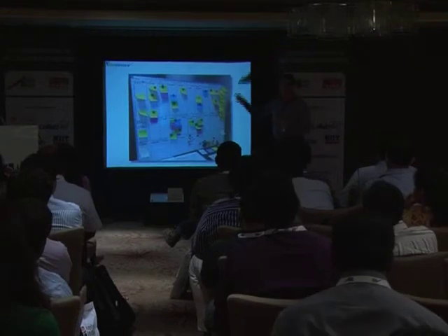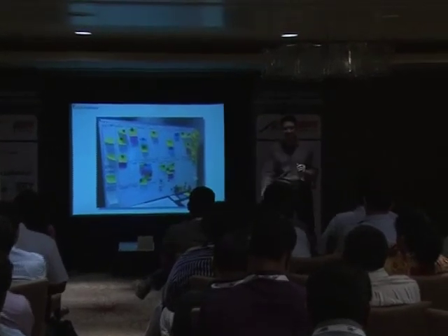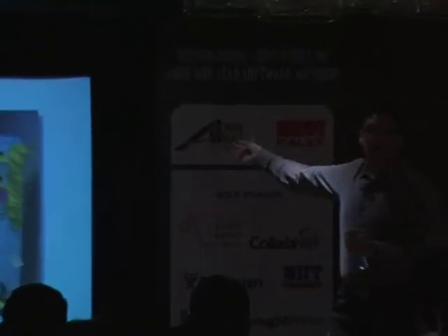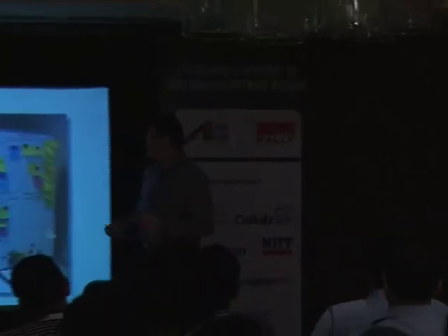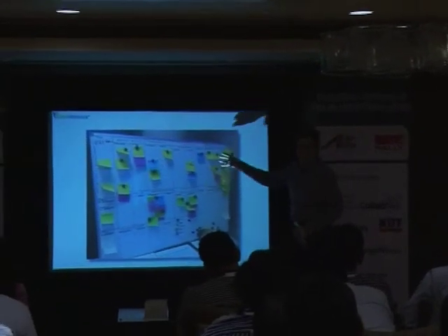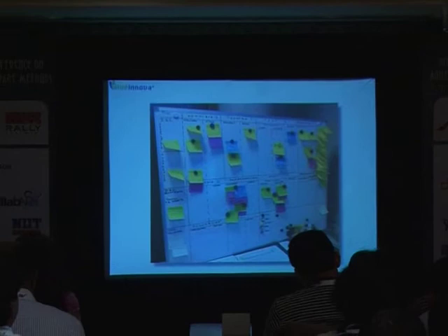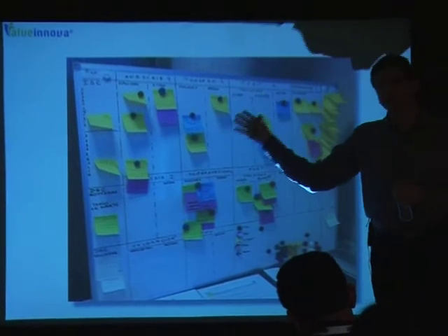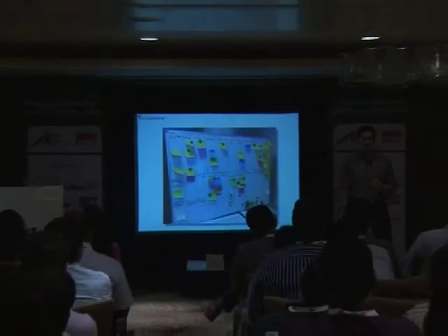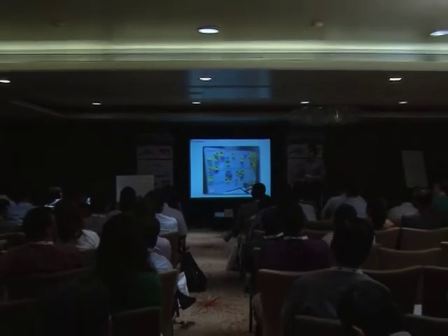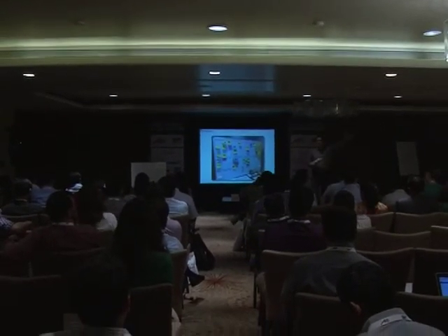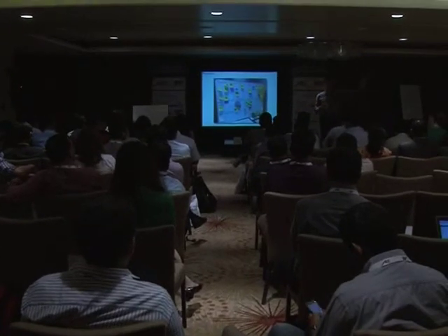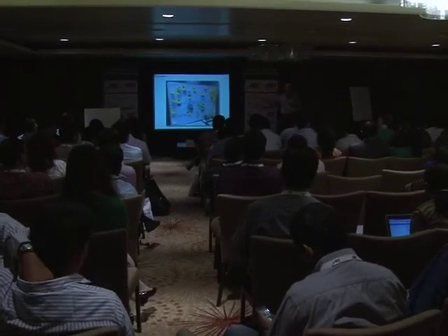So these customers say, okay, Masa, we don't know what to do here. Very simple. Take a photo of this, email it to the customer, call them up, and say, you know what? You are not doing your part, therefore there's no value being obtained from your end. So we're going to finish what we are doing right now, because we are not going to leave things half done. It's not a good practice, it has no economic value. But we are not taking any new tasks to work on because we are wasting our time. So we're just working on this, and then we're going to start working on something for another customer. Once you're ready for us, then we come back to generating value.